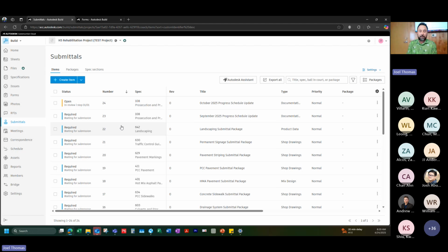I've seen a lot of different ways of this happening, whether it be an email from a contractor or them just uploading it into a shared folder under files or something like that. The cleanest, best way to do this is to have your contractor, even if you've been doing it like this for 20 months, start now and say, what we want to start doing is having the schedule submitted through the submittal module. This gives us a chance to review the schedule.